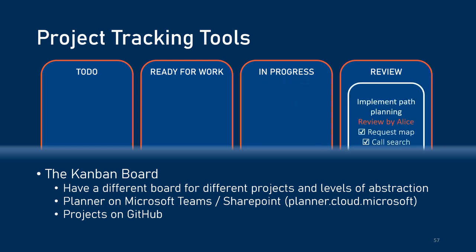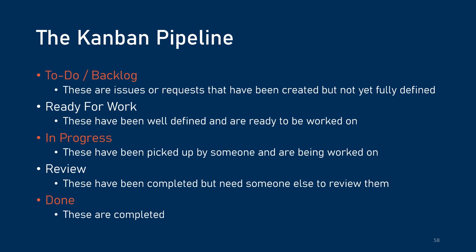Now that Bob's completed it all, it ends up in the Review bin where someone else like Alice could review Bob's implementation. Overall, Kanban-like pipelines tend to go from To-Do, Ready for Work, In Progress, Review, and Done. But the core ones you see most often and the default setting in Planner is To-Do, In Progress, and Done.